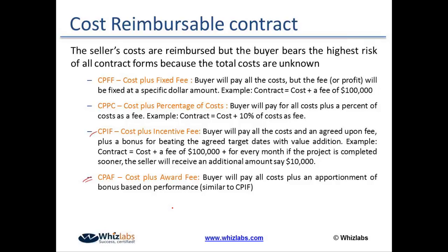The cost going higher, the risk factor related to the cost, who bears it? Who has the risk related to the cost? Yes, guys, in case the cost goes high, who pays for it? Yes, the buyer. Because the seller is in a very safe zone, he doesn't need to pay anything extra. He is simply getting the cost reimbursed by the buyer. So the buyer has the maximum risk from the cost point of view.